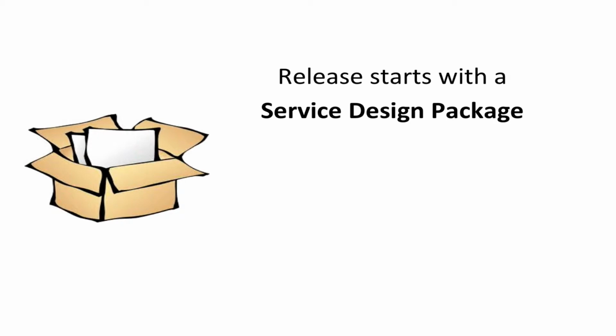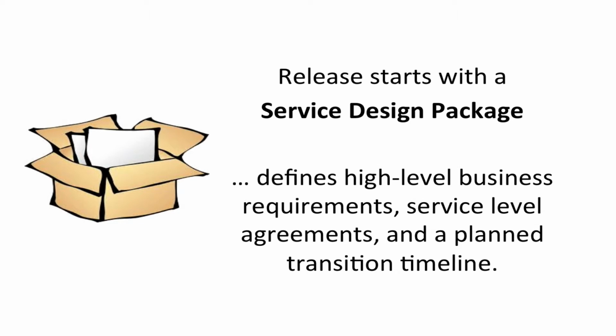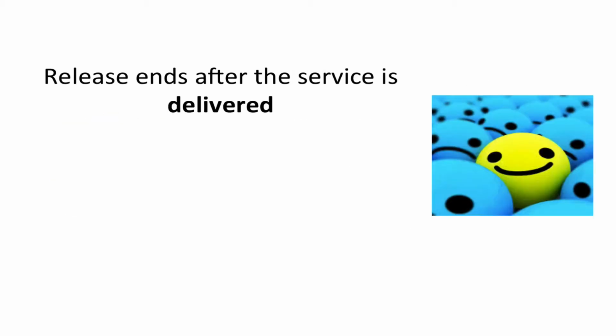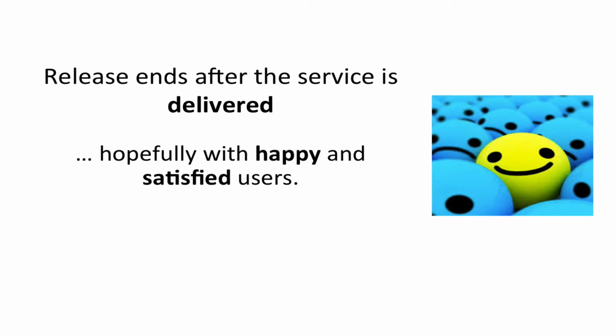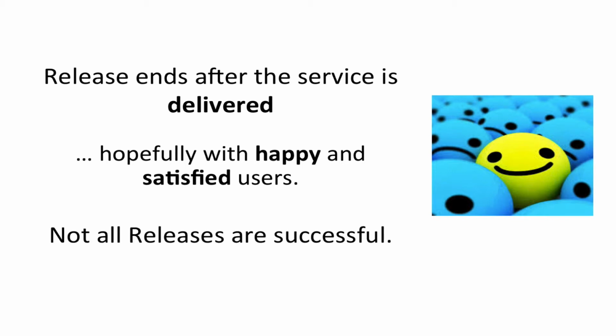A release starts with a definition of what ITIL calls a service design package, which defines high-level business requirements, service-level agreements, and a planned transition timeline. A release ends after the service is delivered, hopefully with happy and satisfied users. But we have to be honest, not all releases are successful. And service transitions don't iterate. They either fail or are successful as they go forward.